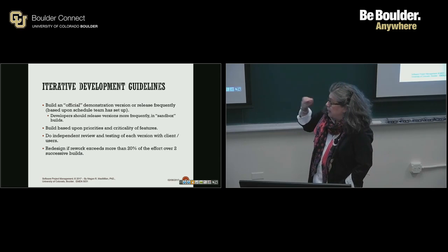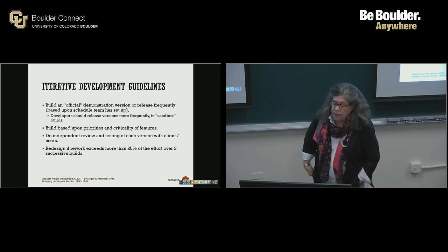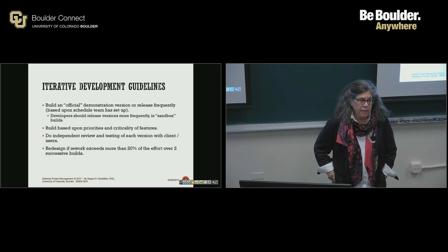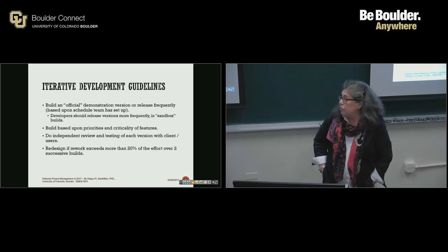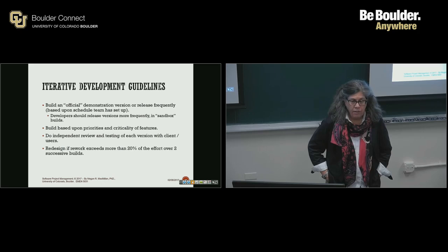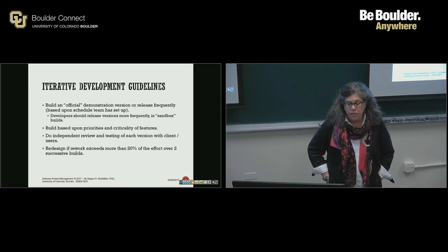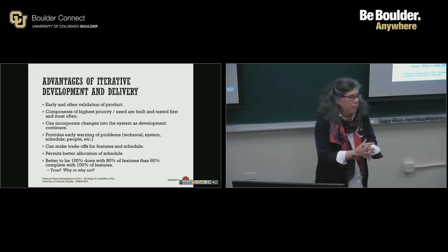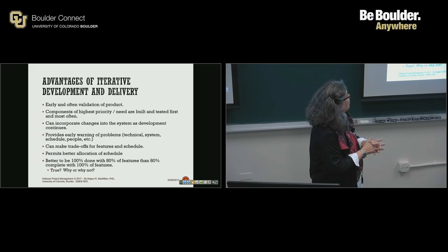If redesign is more than 20% of the effort after about 2 builds, you need to rethink it. You need to redesign it, redo it, whatever. If you're finding that you're getting more negative feedback than positive after a couple of sprints, redesign it, rethink it, and figure out if you're building something they didn't want. So again, why is it cool? Because there's a lot of validation. You only get done what people really want.